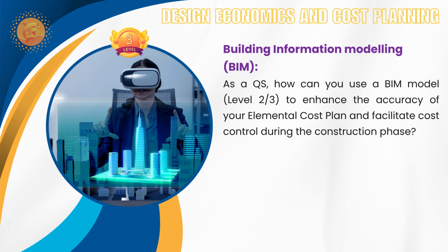The BIM system is also helpful for clash detection, which proactively helps you resolve issues during design development. But still, the input done by a human can carry human error. This will lead to cost data extracted from the BIM itself being wrongly misleading. So you have to clearly verify for human error when you are implementing BIM also.